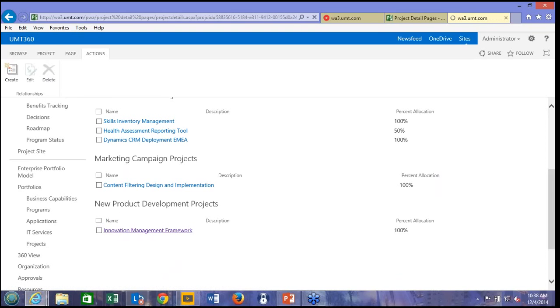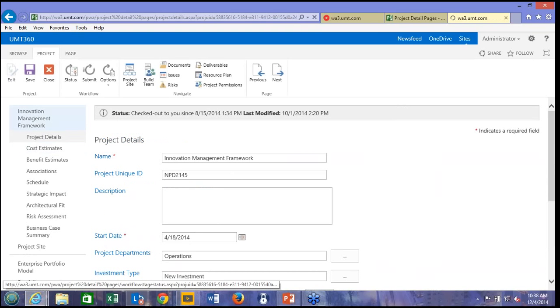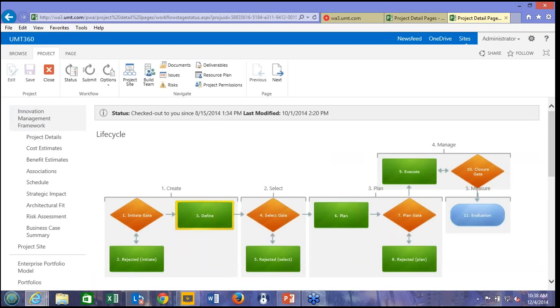I'm not going to show this next capability, but it's an important one to understand. So hopefully you've seen what constitutes a world-class business case. Obviously you've got the project site for document management and everything else that you need that for in Project Server. Another key area or feature we see being used is snapshotting. You can snapshot and keep an auditable record of project financials, metrics, and other metadata pertaining to the project at any point.